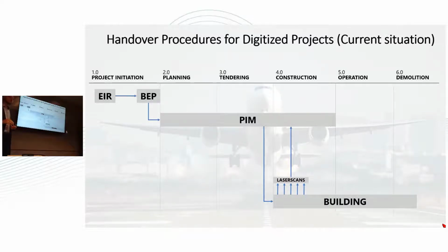Then you can go to the construction site and say, stop, this column is wrong, or this air vent is in a completely wrong position. Otherwise, they have proceeded so much that it's too late. And then the design needs a lot of repairing in the model, a lot of things to change, so that everything else fits together again.